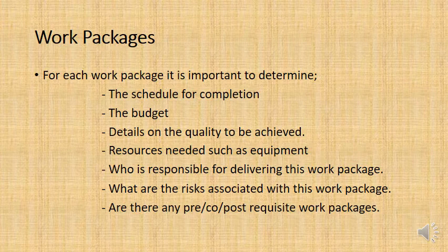So if it's construction work in this work package, potentially you might need a digger, maybe you need a roller or a grader, maybe you need software equipment to do the design work, who knows. But you also list who is responsible for delivering the work package, so everyone has a clear idea on what their responsibilities are.